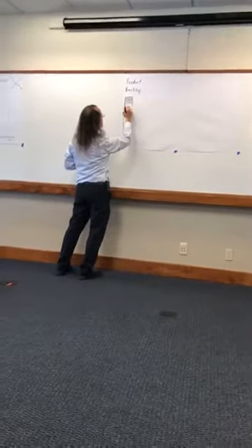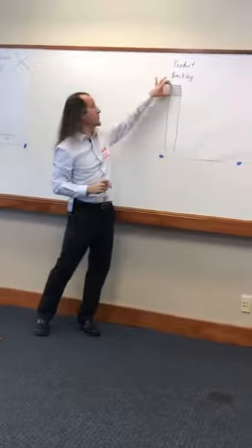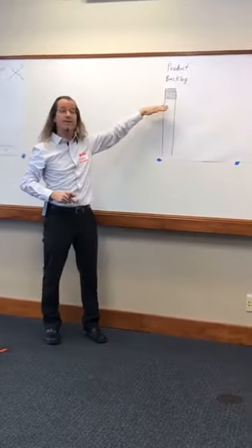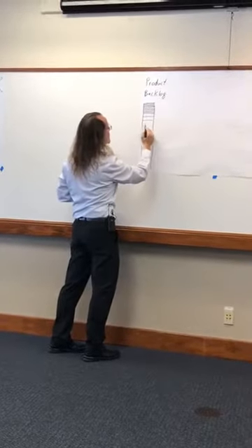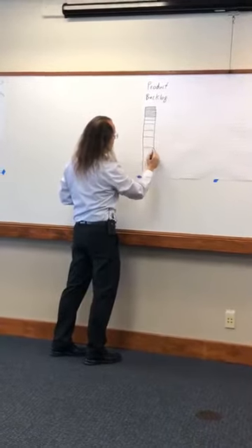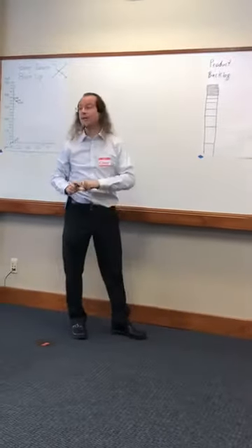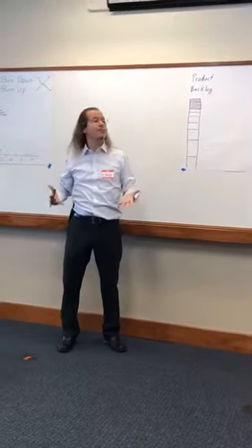These little sprint-ready stories. Maybe we've got 2 to 3 sprints' worth of sprint-ready stories collected at the top of our product backlog. Now, as we look farther out into the future in our product backlog, those stories start to get gradually bigger and bigger and less well-defined, and that's okay, because we're going to have time before we get to them.